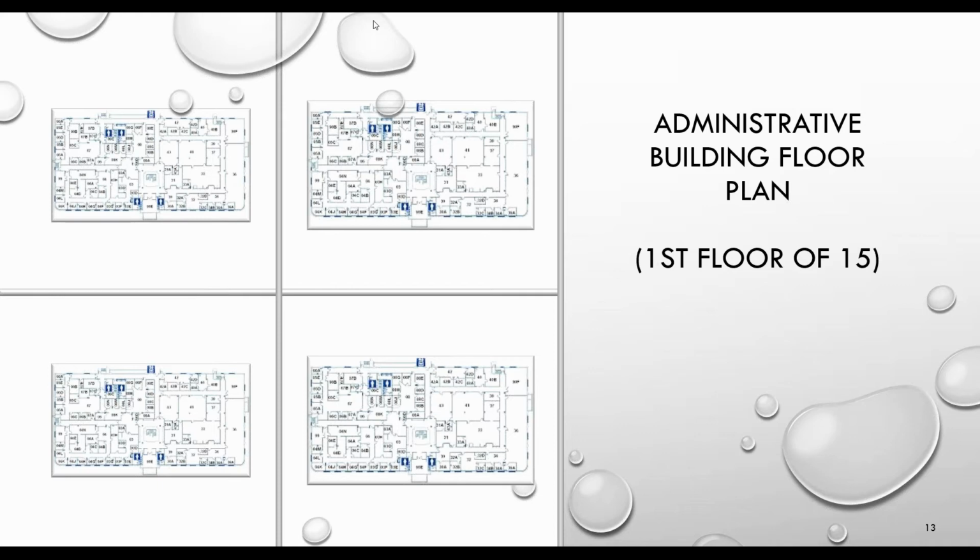But to get a detailed and fine scope, you're going to have a sketch of the building. Now, sometimes that takes a long time. Sometimes we use a fire escape plan like in a hotel, but it'll show the room, but it doesn't show the bathrooms, it doesn't show the kitchen. It actually just has a block of the size of the room that's not to scale, and it shows people how to get out in case of a fire. So you can start with that, but when you start to do your detailed scope, then that will not necessarily be the sketch that you'll be able to use. So you've got to get that sketch.